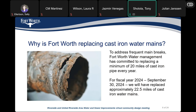Why is the City of Fort Worth Water Department replacing cast iron water mains? Firstly, to address frequent main breaks. As most of you are aware, we have frequent breaks all over town on some of our old cast iron lines. To that effect, we've committed to replacing 20 miles of cast iron water mains every year. For this fiscal year, we will have replaced approximately 22.5 miles — a little bit ahead of what we promised to deliver.